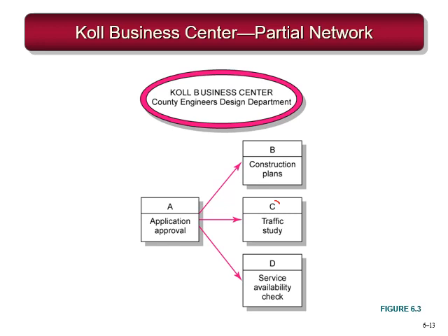You can finish B and then start C. There is no restriction on that. But the restriction is, you have to complete A before you start B, C and D. So these are parallel activities which can or cannot be started at the same time. So it is the discretion of the project manager.